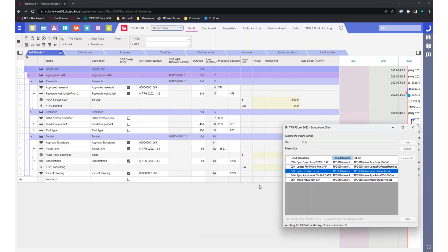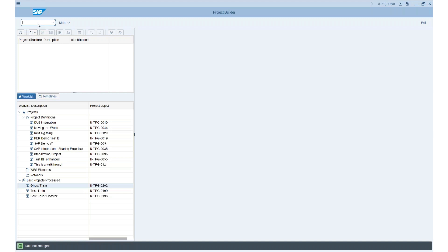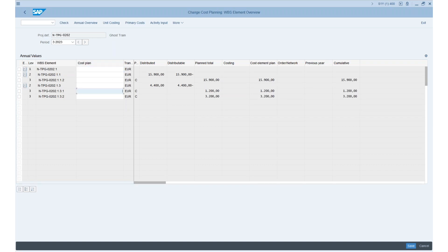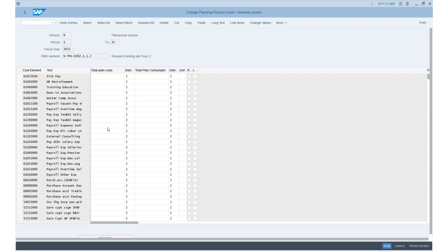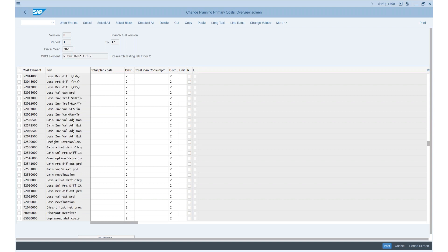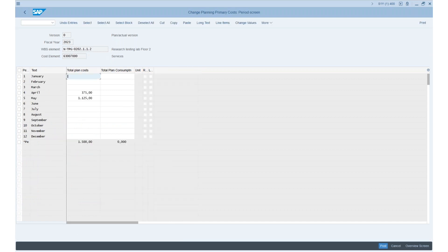Let's see the result in SAP. I'm going to use transaction CJ40 for the cost planning. I'll open primary costs — this is the primary cost planning. Scrolling to find my 1,500 euros of service costs, we see the same cost element number as before. Looking at the detail, here are exactly the same costs in April and in May for this project. You can get an idea of how easy it is to make a financial planning, because you already have it laid out over the timeline in your PPM system.